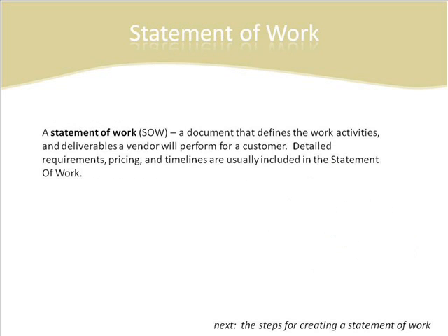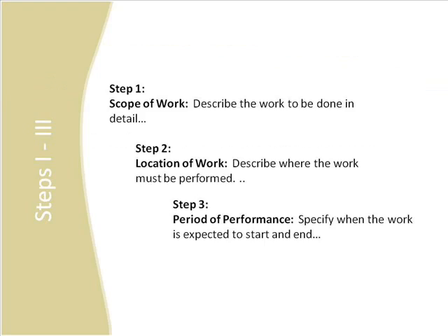Next up, we have the statement of work. The statement of work is a formal document that captures and defines the work activities, deliverables, and a timeline a vendor will execute against in performance of specified work for a customer. Detailed requirements and pricing are usually included in the statement of work, along with the standard regulatory and governance terms and conditions. Now that you have an idea of what is involved in getting started, let's spend some time explaining how to logically prepare your documentation.